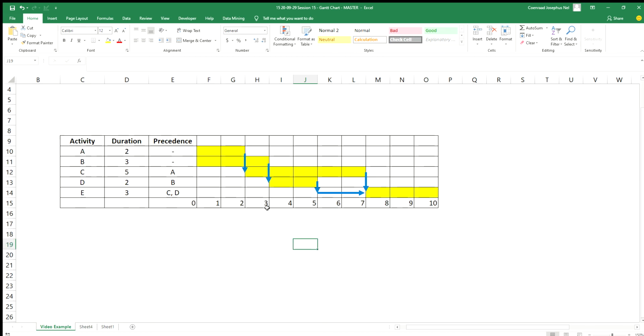So if you look at this, then we said, what do you need to do? You need to identify the float. We already did that. So there's a float over there, which means this activity and actually that activity can move up by 2 without delaying the total project. Okay. So to identify the critical path, the same as we did with the precedence diagrams earlier, we look at the activities without any float, without any movement.